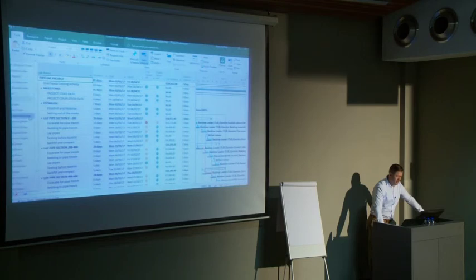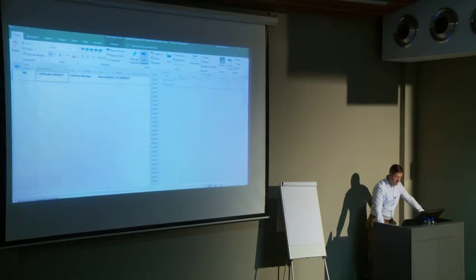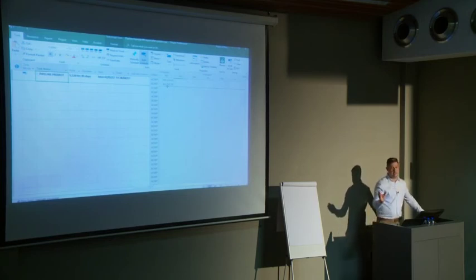So once I did the update, I'll go to my task usage again, roll it up. There are those values, actual value and earned value. So that earned value is very, very accurate if my update is accurate. Because I've said these are the activities that started, that's where we are. So it's a very objective measure. And now it calculates the cost value of the activities as they progressed. So can you see how easy MS Project, if you use it correctly, makes your life?